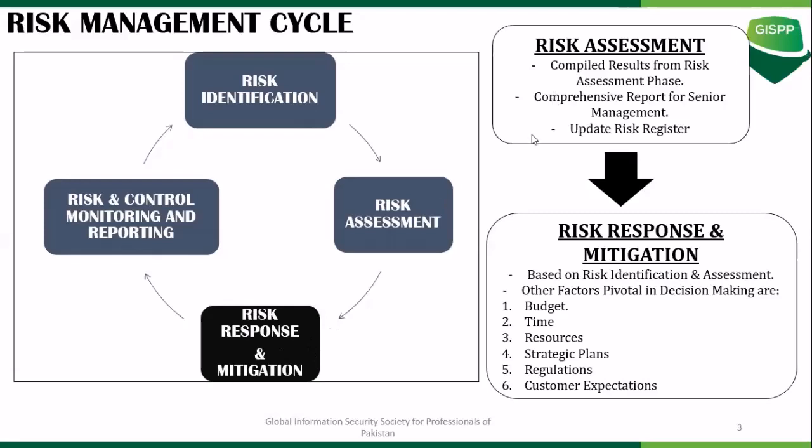I'll just go back for a minute to the risk assessment phase and how it gets linked with risk response and mitigation. At the conclusion of the IT risk assessment phase, the risk practitioner compiles the results of the risk assessment into a comprehensive report for senior management to look at. Once this report is prepared, you also update your risk register, and the output of the risk assessment phase is fed into the risk response and mitigation phase.